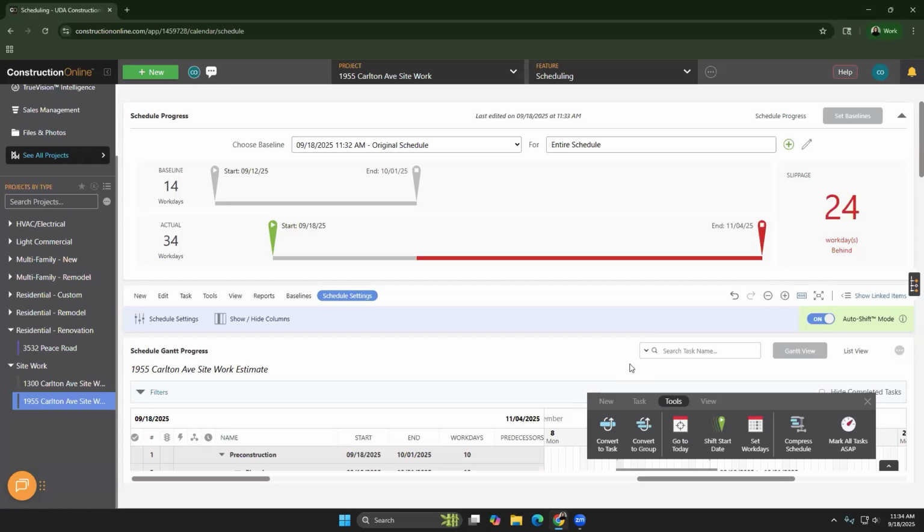Yeah, so other times that you may use a baseline are, for example, in my schedule, I have it as phase construction. Sometimes what I'll see people do is they will have their original baseline. They will also be able to go in and then at the beginning of phase 1 or phase 2, they can take an updated baseline. So basically, what that allows you to do is if we're working through a schedule on a job, when we are entering phase 1, maybe we don't really care about the slippage we're experiencing. We just want to get a more updated timeline to document.